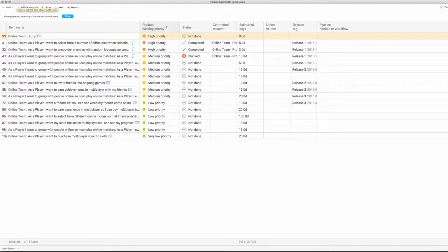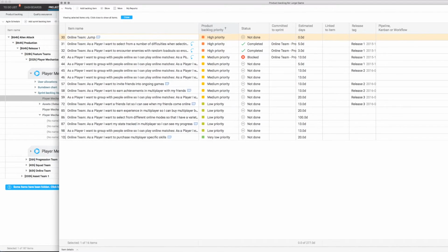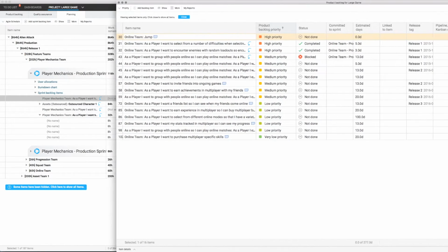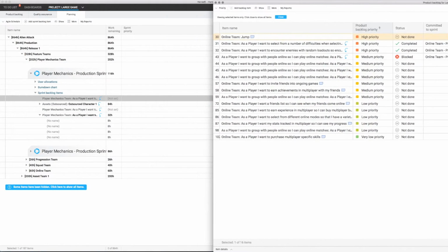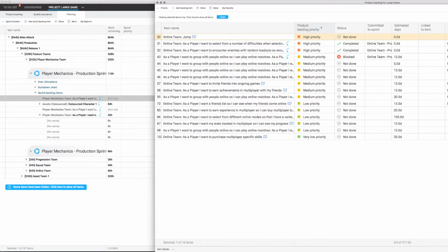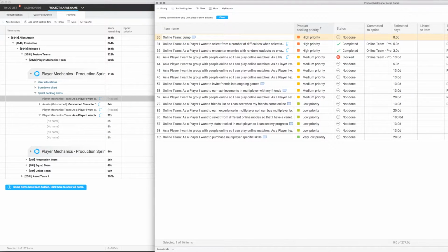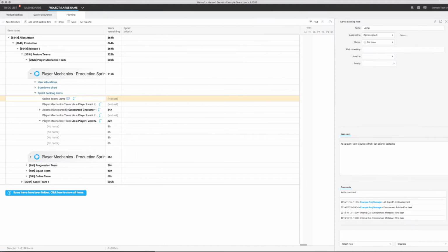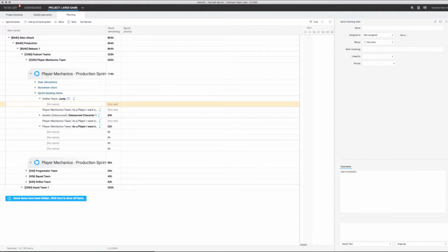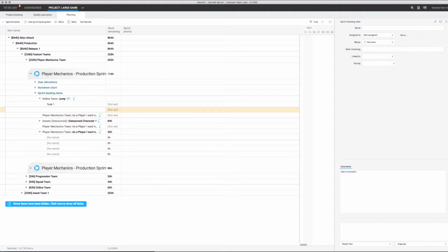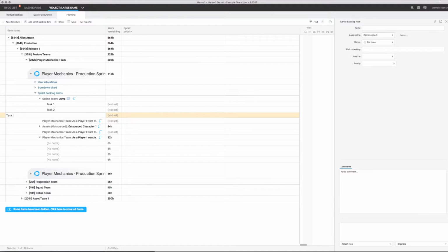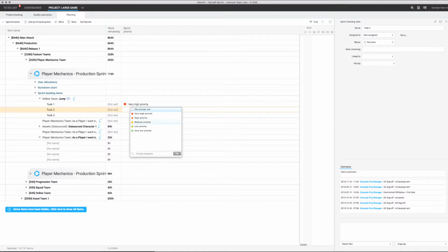Now I want to talk about a few simple, concrete practices that can help you be more efficient in how you use Hansoft. If we look at a user story in the product backlog, some teams tend to break it down a bit too much. You should really try to keep the information in the product backlog on a level of detail that your customer gets value from once it is delivered. Instead, break it down into more detailed tasks, if needed, first in the planning view.